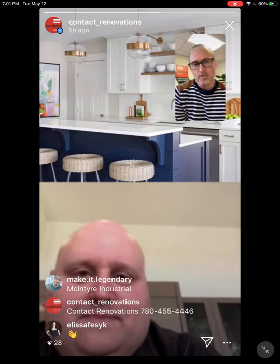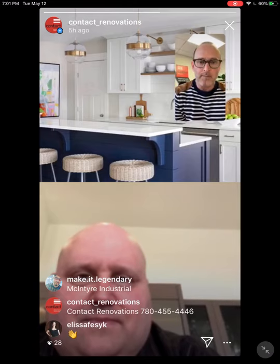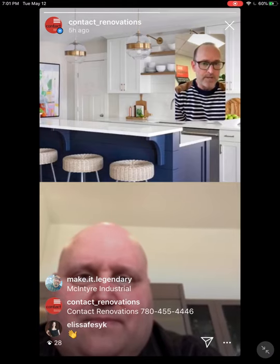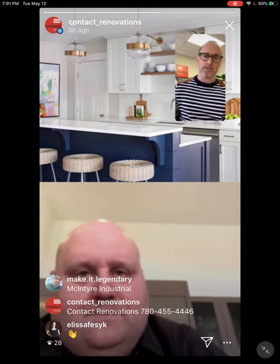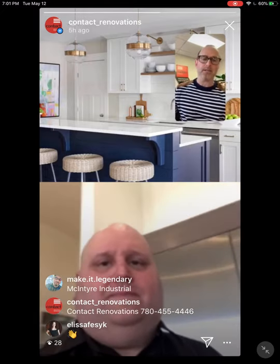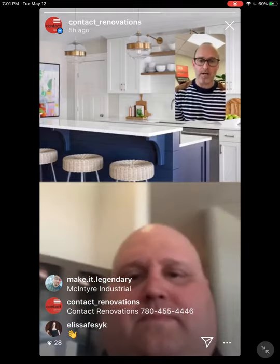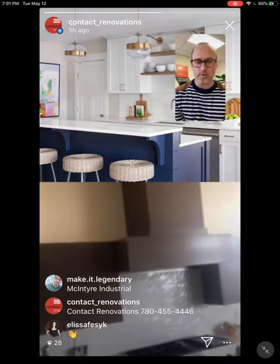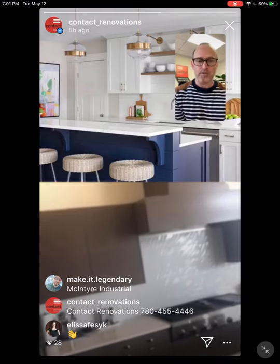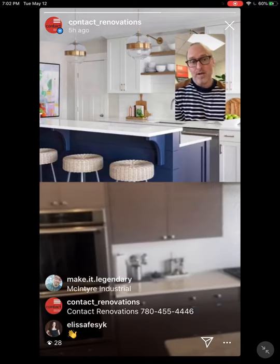You know, Gerry touched on your kitchen design. Yeah, you should get involved with the designer early on. But one thing we've run into before is making sure your designer and your contractor are in communication, because we've often had clients bring forward an amazing kitchen design, but then it turns out the actual construction cost, not just of the cabinetry, but of all the logistical and framework needed to make that kitchen pass inspections, sometimes runs too high.